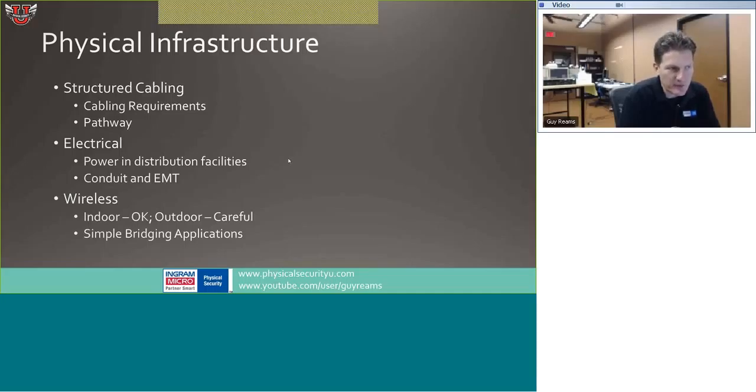On outdoor, be careful. When you start getting into outdoor camera installations, and you start going across long distances, and you start dealing with the public Wi-Fi spectrum, you are asking for trouble if you do not know how to do wireless and you start dabbling. Take it from the renegade guy like me who decided to jump in and start doing wireless projects at a young age. I lost my pants several times underbidding projects where I put in wireless and I just could not get them to work. So outdoor, you need to be careful.